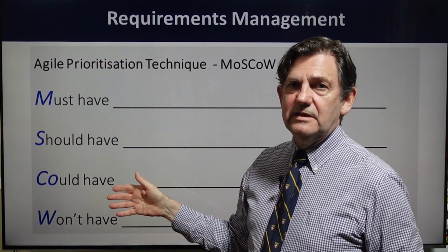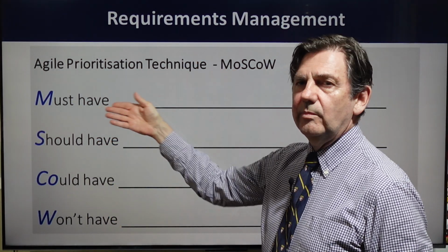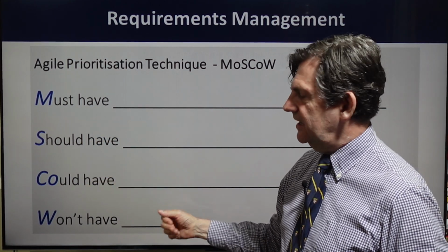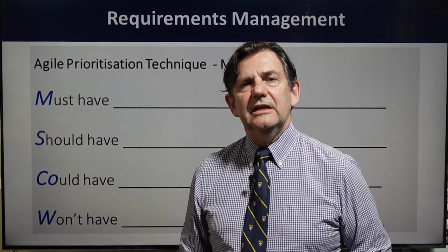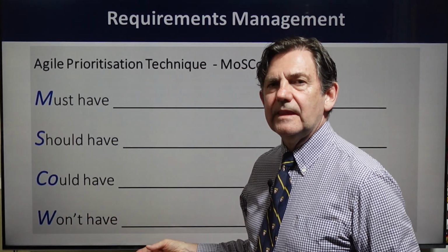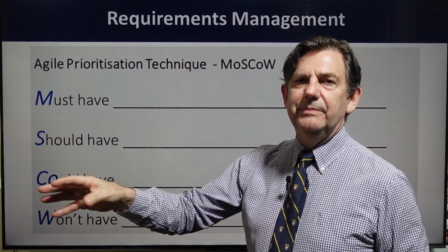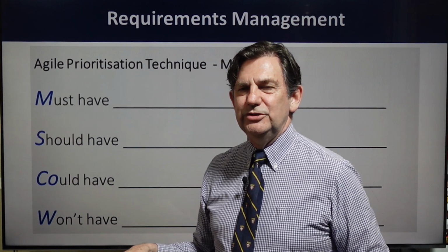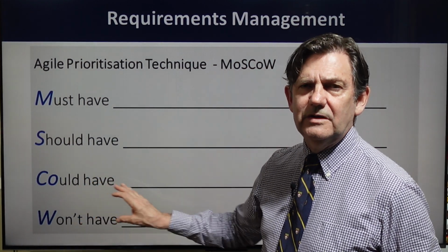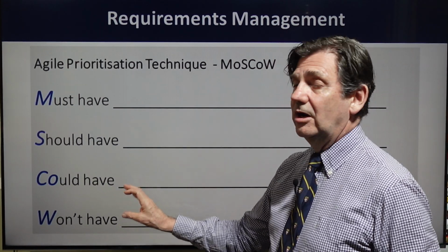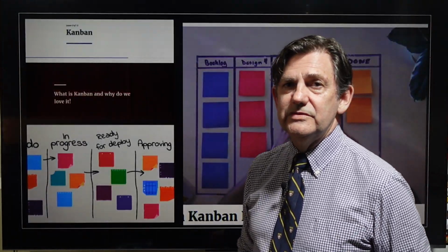I do love this principle of what must the new service have, what should it have, what could it have, and what won't it have. And particularly with anything new, I always like to focus absolutely on the must-haves and the won't-haves. The should-have we can park for later. The could-have, in many ways, these are sort of ego projects or pride projects, and often they can just take up vast amounts of time.